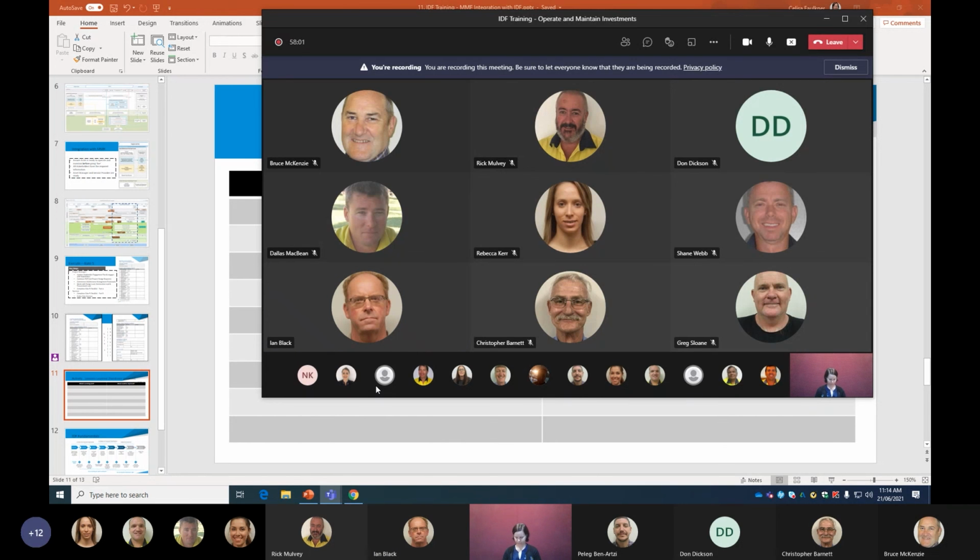Ian, I might just add as well, we've got in our checklist for the select and define phase that we firstly develop our risk register and scope of works in that select phase, but then that's updated as we progress through further design in the define phase. So that's really when we need to be getting stakeholders such as yourself to input through those planning phases and make sure we haven't missed any risks in the construction or operations, and also that we're capturing all the scope of work so we don't miss any of those items.